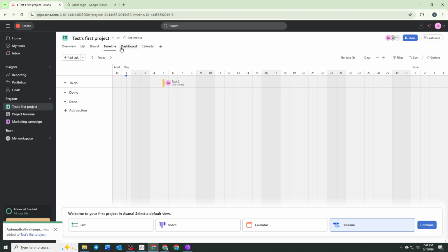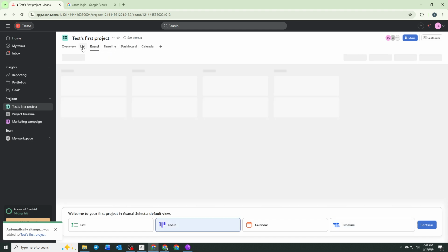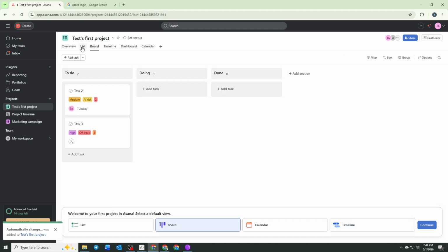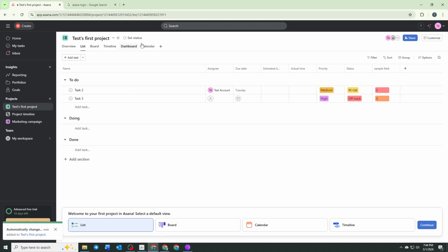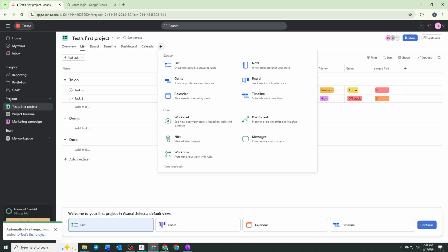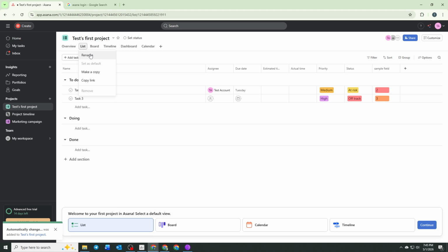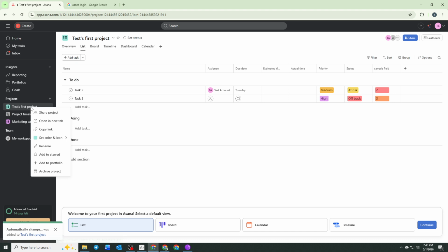Inconsistent processes can be improved by using standardized project templates, consistent naming practices, and uniform field structures. This helps ensure that everyone follows the same workflow without needing repeated instructions. To reduce repetitive manual effort, automation through rules can be used to assign tasks, update statuses, or move work between stages automatically. This minimizes errors and improves efficiency.